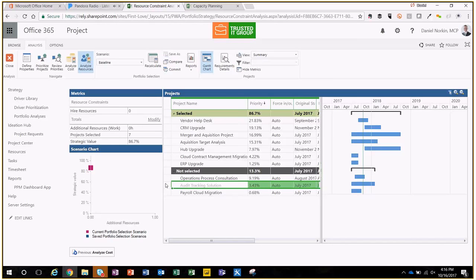Well, you can't just force it because you don't have the people for it. So forcing in this situation doesn't work, but you can move a project either forward or back, right? You can move a project out, then that frees up the resources, or you can just do what's easy and just hire more people. Let's say that these projects need to happen. But now, here's the trick. I like to play this game, right? How many people do we need to hire in order to do all 10 of these projects?